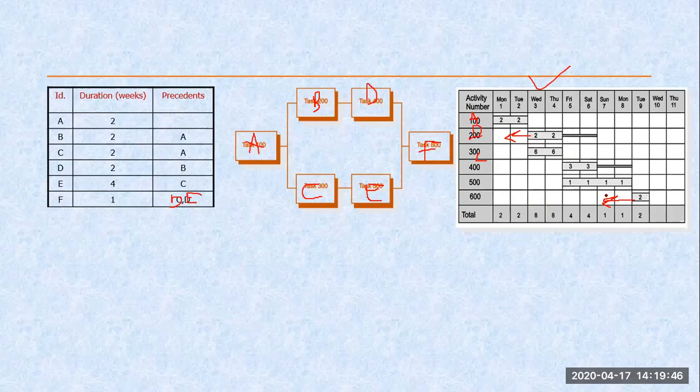So if I prepone this, here I get 4, here I get 4, and here my 6 resources instead of 8. Maybe if I prepone this task depending upon the slack time, whether the delay is possible. If delay is not possible, then we can check how much preponing is possible.